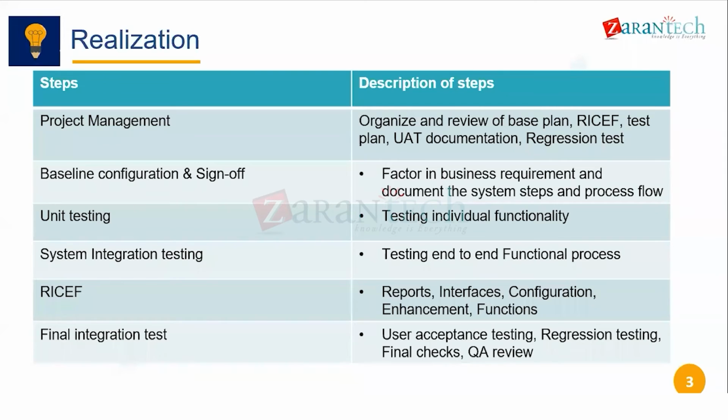Once you do these configuration steps in the system, you review the baseline configuration with the business and get their sign off. Then these two activities run in parallel, because whenever they sign off, they at least would like to see whether this functionality is working or not. So they will also ask maybe for the unit test result. They may ask, if this has been set up, how can I guarantee that this works this way? So you can show them the unit testing results.